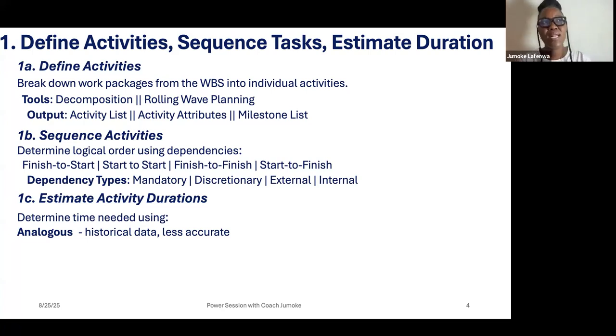I can say, okay, when I did it 2 years ago, I used an average of 4 yards per robe, and it was 2 Ghana cedis. So it means for each person is 2 times 4 for the robe, 8 cedis. So I've used historical data. But the cost of fabric in 2025 may not be the same as 2023. That's why we say that it is less accurate.